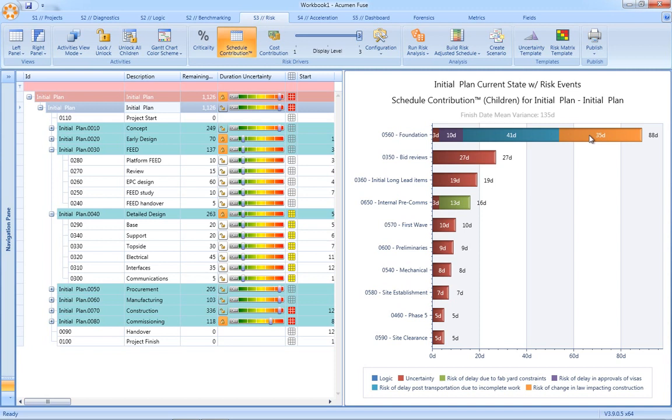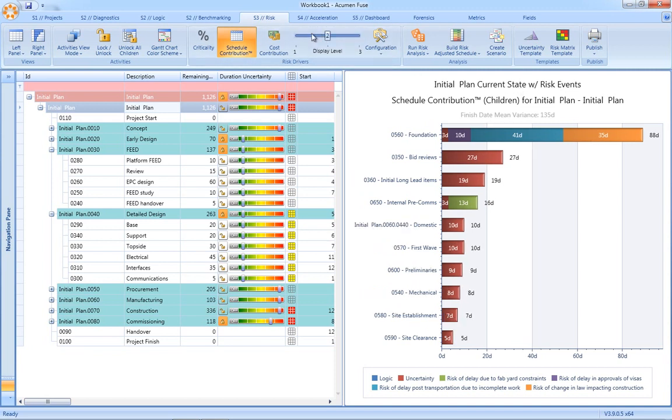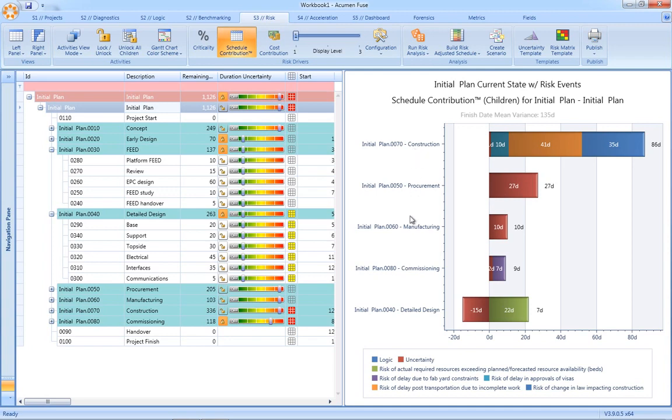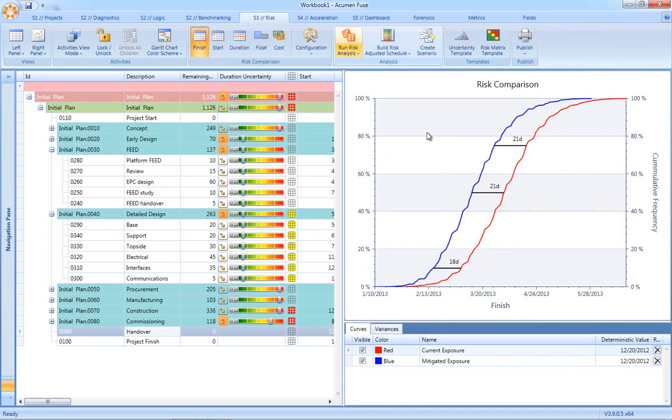Another unique capability of the Acumen Risk Tornado chart is to be able to roll up the tornado to specific levels within our WBS. The example being here, we've rolled all the way up to level 1, we can see a breakout now between construction, procurement, manufacturing, and commissioning.